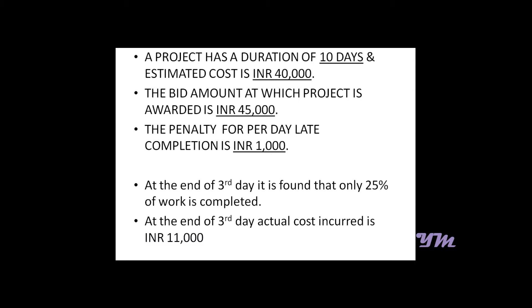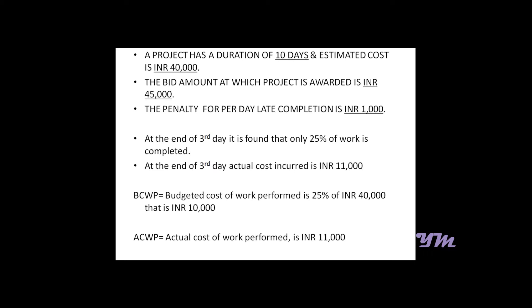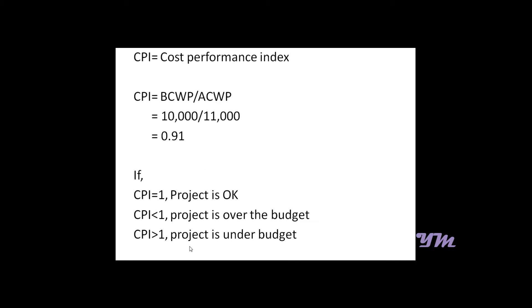At the end of the third day, it is found that only 25% of the work is completed and the actual cost incurred is 11,000. So 25% of 40,000 is rupees 10,000, which is known as Budgeted Cost of Work Performed, while Actual Cost of Work Performed is rupees 11,000.